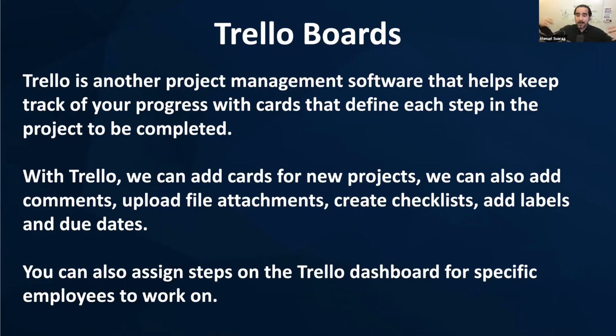Because of that, we found it more effective to insert a board into the equation. So now we have the entire project divided into steps on a board. When the person responsible for that particular step is done, all they have to do is grab their mouse and drag it into the next step. The person assigned to that next step gets a notification that lets them know the board is now in their hands and they have to keep it moving forward. Otherwise, it's going to stay stuck.